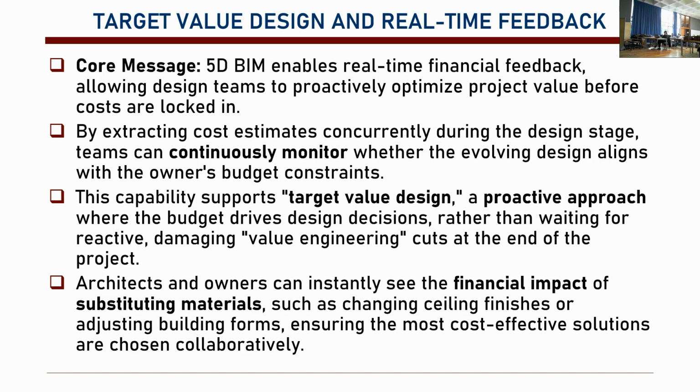If we go for reactive value engineering cuts, that is damaging. For instance, let's say your ultimate aim is to create a very luxury restaurant, and you have only 5 million liras. At the beginning, if you put all these things together, it will tell you that it's not going to be 5, it's going to be 6. Then it will ask you, what do you want to cut?